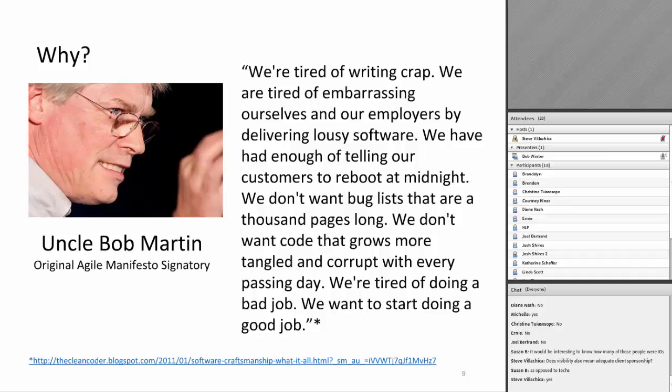There is built into the practice of Scrum, if any of you do it, a regular retrospective. So our team, at the end of every 2 weeks, we have a meeting specifically dedicated to talking about what went well and what we can improve on. And as a takeaway from that, we make a commitment to do one thing to improve whatever our most egregious problem is at that time. Right? Very powerful. If you can set up a system and process to do that, that's going to be really key to continuous improvement, they call it. Other methods call it different things, but continuous improvement is how I refer to it.